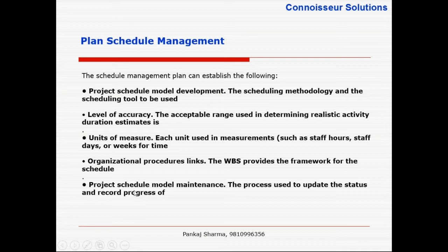Now, listen, as a good practice, the schedule of a project should be updated on a daily basis. Schedule should always be updated daily. My suggestion is, when you decompose work packages into activities, do not have any activity which is greater than 1 day, so that at the end of the day when you track the status, you should only say either 0% done or 100% done. No 25%, 35%, 45%, 50%, because that creates more ambiguity and makes your schedule unpredictable.